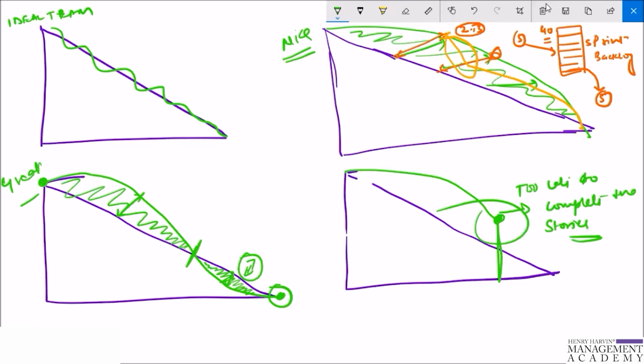The team did not adapt the sprint scope to an appropriate level, and it shows that the team has not completed stories that should have been split or moved to the next sprint. So in such a situation, the capacity of the next sprint should be lowered. And if this happens again, corrective action should be taken after a few days when slower progress is observed. Typically, lower priority stories should have moved to the next sprint or back to the product backlog.